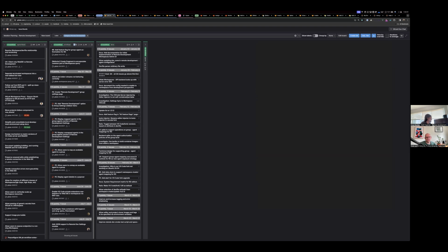We did the same thing. We had a GA release marker, and if you drag everything below that marker, then that marker is now in the iteration you want, in 16.0. And we have, quantifiably based on our actual velocity and everybody not trying to kill themselves and work overtime, a reasonable expectation of meeting that, and we did.